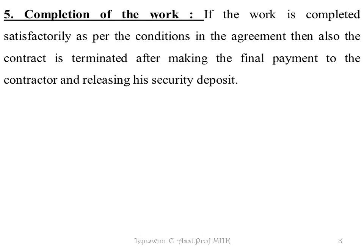Fifth — Completion of Work: If the work is completed satisfactorily as per the conditions in the agreement, then also the contract is terminated after making the final payment to the contractor and releasing his security deposit. After the completion of work satisfactorily, the final payment is made and the security deposit held by the client is also released.